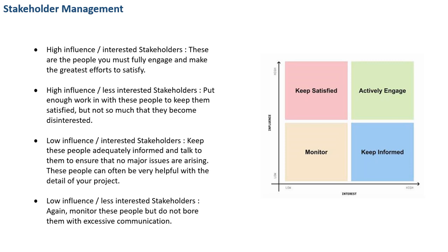So in terms of managing stakeholders, obviously there's a lot of stakeholders in that previous slide, and if you flesh it out into individual stakeholders across the business for large solutions, you could be getting into many dozens. So you do need to prioritize your stakeholder management, and this is quite a common diagram that people probably might have seen in terms of satisfying stakeholders. There'll be stakeholders with low to high interest, stakeholders with low to high influence. So you probably want to prioritize on the actively engaged, but you need to engage all stakeholders, but you need to prioritize your time around this area.